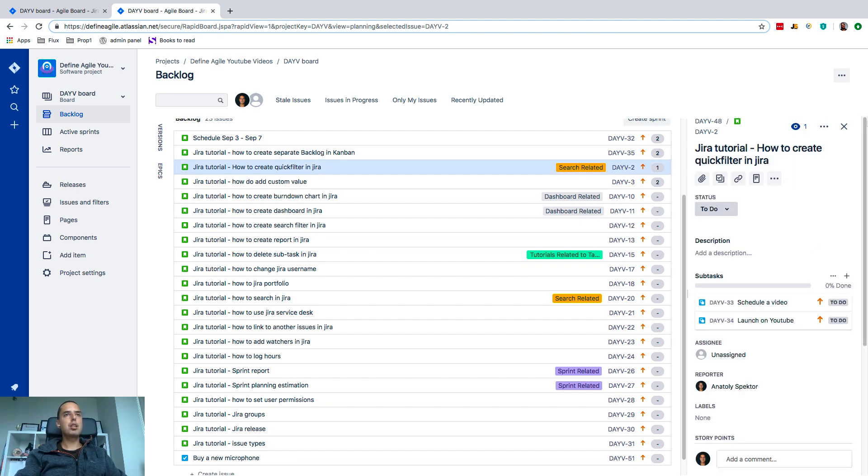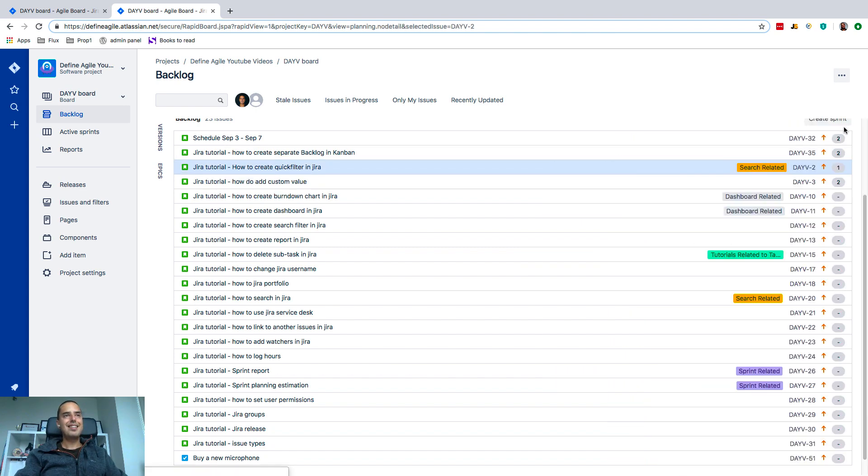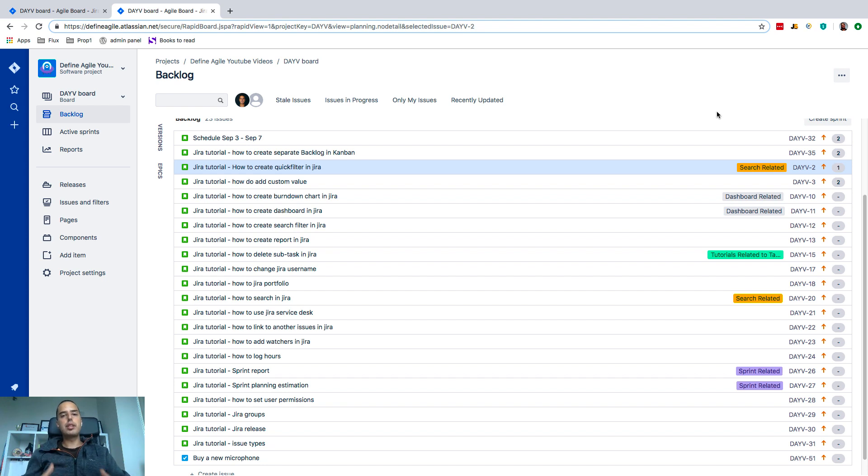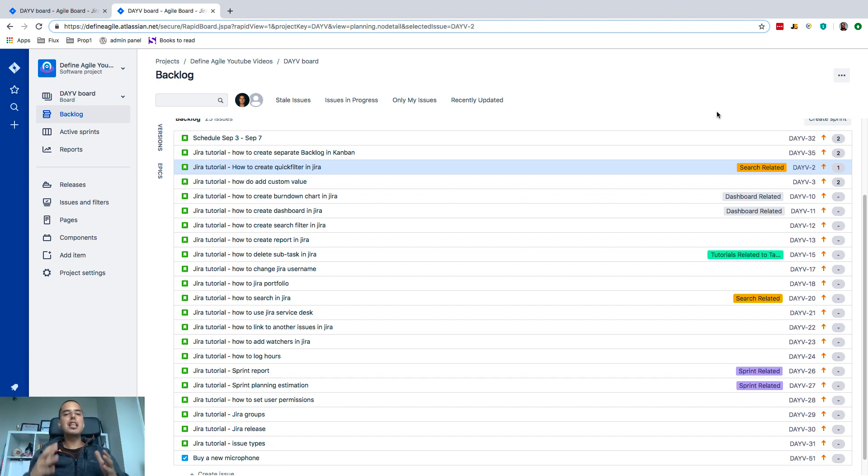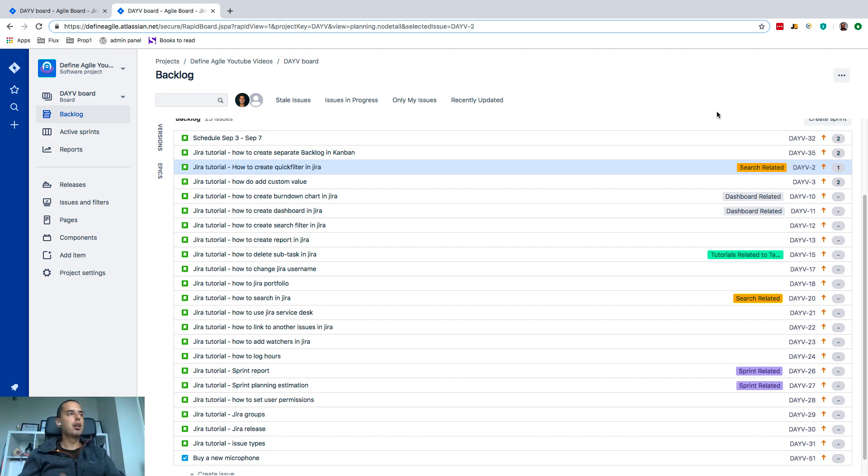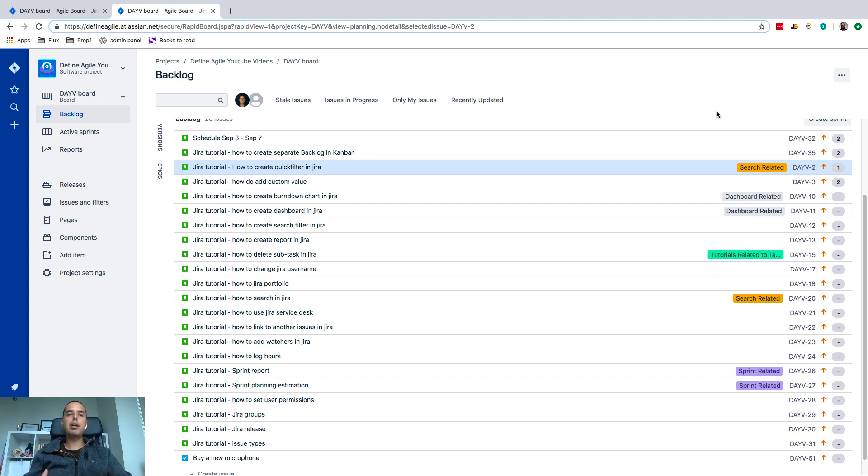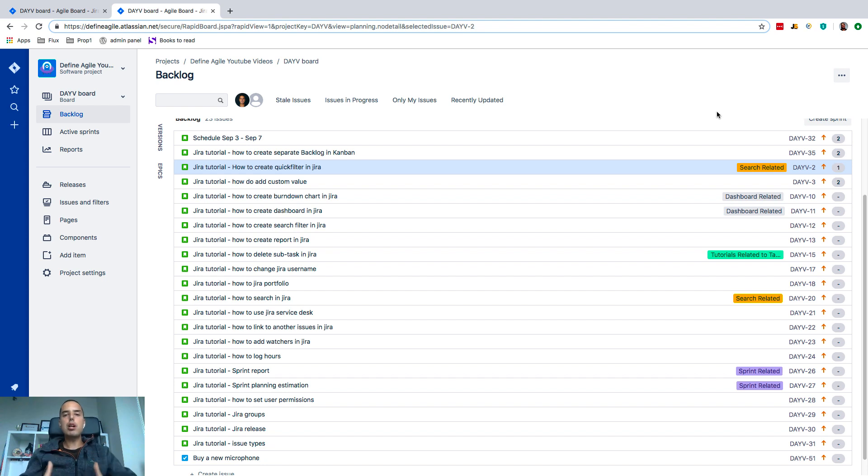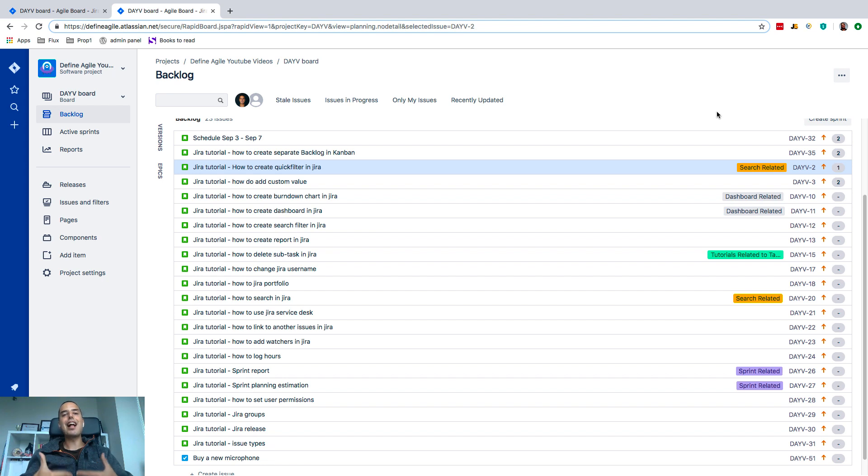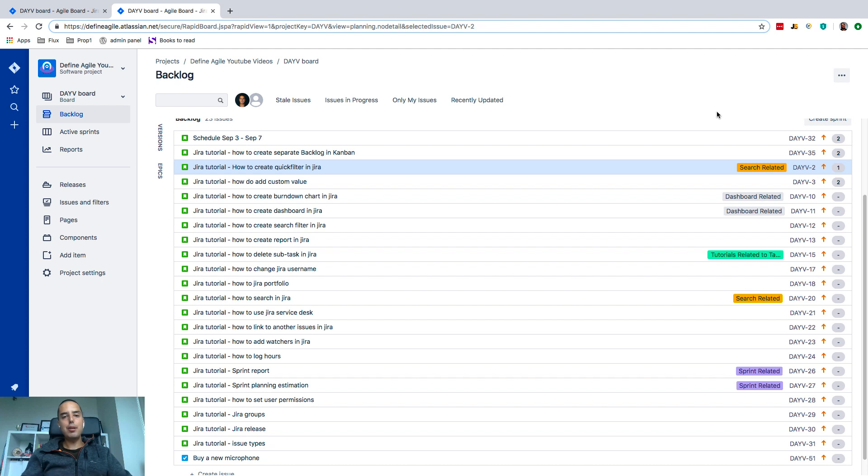So what is the difference? Why do we need tasks and why do we need stories? That's a great question, and I'll explain you how we use them in our teams. In our teams we say that stories deliver business value, while tasks do not. For example, if I have a story that says 'how to create quick filter in Jira,' the business value would be for me to deliver a final project and for you guys to consume it. So this is a story because I'm bringing some value to my end customers, who are the viewers of my YouTube channel.